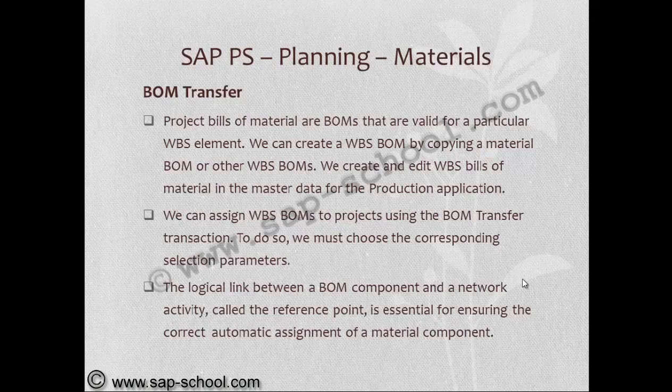We can create a WBS BOM by copying a material BOM or other WBS BOMs. We create and edit WBS bills of material in the material data for the production application. We can assign WBS BOMs to a project using the BOM transfer transaction.